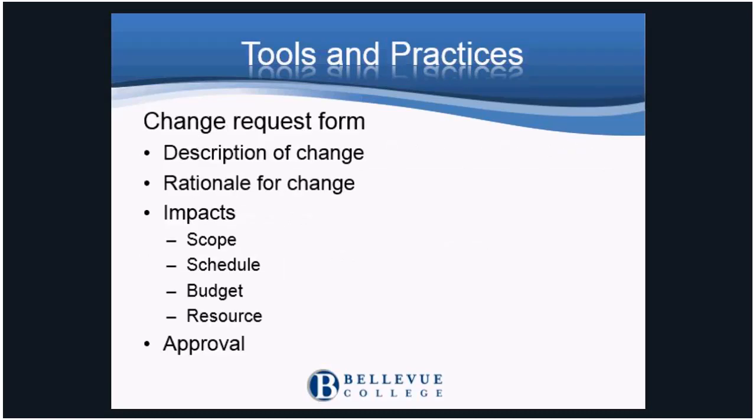The change request is used if there is a change to scope, schedule, or budget. If there has been an issue or risk that becomes an issue that cannot be avoided or mitigated using a workaround or contingency. The change request is a change to baseline and needs the same approval that a charter had to establish the initial requirements.